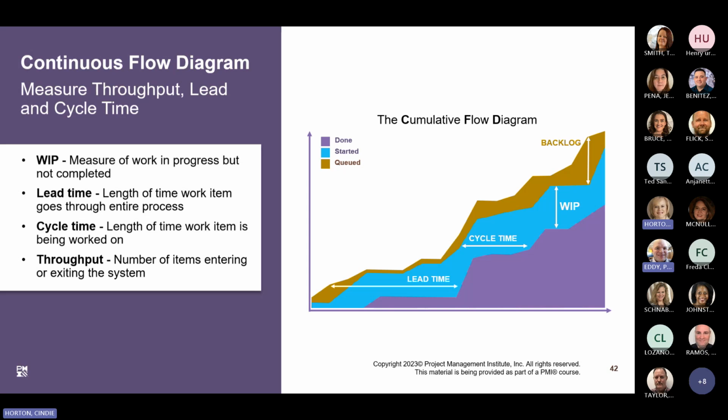The cumulative flow diagram, CFD, is an analytical tool that allows teams to visualize effort and progress. It shows where impediments will occur. Looking at the graph, the line should be smooth and rise gently as the graph tracks the number of work items entering and exiting the queue. Ideally, this rate should be constant. This graph indicates that there is a potential issue with lead time. A bump or a sudden ascent or descent indicates a surge or a lag in something.